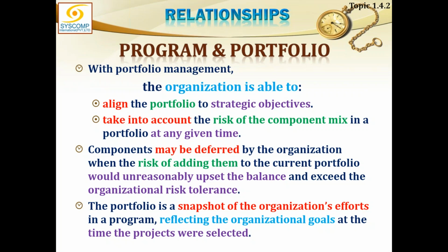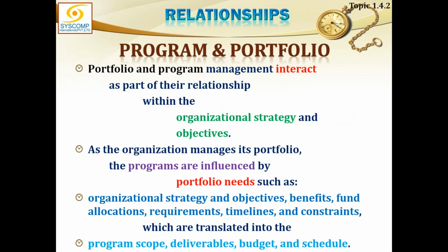Portfolio takes a snapshot of the organizational efforts in a program, reflecting the organizational goals at the time the project was selected. Portfolio and program management interact as part of their relationship within the organization strategy and objectives. As the organization manages its portfolio, the programs are influenced by portfolio needs such as organizational strategy and objectives, benefits, fund allocation, requirements, timelines, and constraints, which are translated into the program scope, deliverables, budget, and schedule.